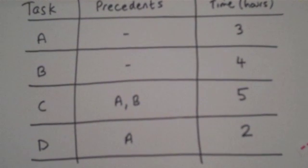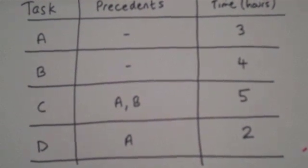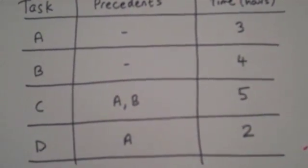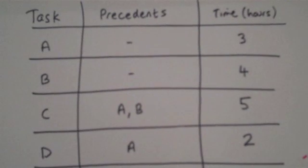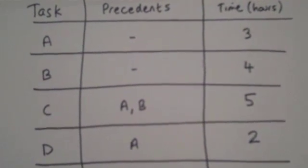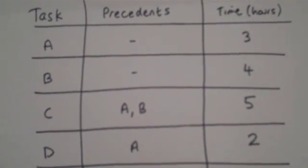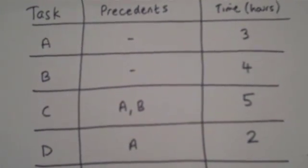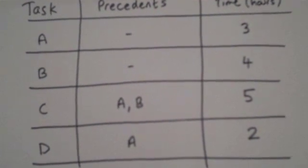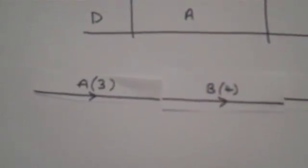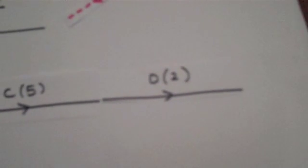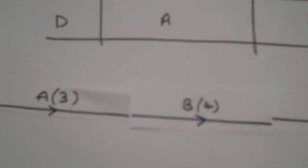Down the right-hand side is the time each task takes. A takes 3 hours, B takes 4, C takes 5, and D takes 2. What's important is that C must happen after A and B, and D must happen after A. If one person were doing this, it would take 14 hours.